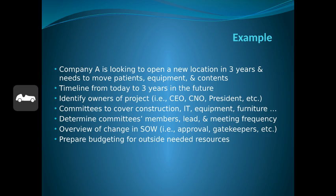For example, in hospitals, a lot of times as the equipment person, I'm in joint meetings very frequently. Sometimes it's once a month, then it's usually once a week when it gets closer to the opening stages, where I'm meeting with the heads of the different trades, the masonry people, the plumbers, electrical, general contractor, also with other colleagues that I'm working with directly on IT or furniture type equipment, plus the actual department heads of the departments, to notify them when certain items are being installed, updated, tested, so that they can know from certification purposes when it's ready to be used. That's why this whole process is lengthy, but proper planning makes it much easier as you put things in motion.